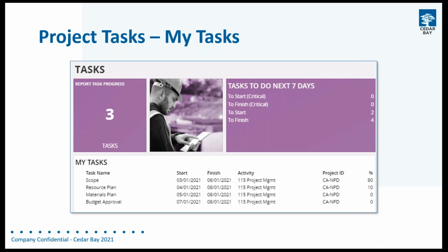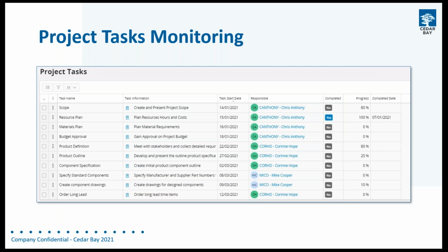And reporting progress is done slightly different to the way we report time. We can see on an activity that we have 200 hours that's been planned, and we have reported 150 hours, which means we are 3/4 of the way, 75% complete. But that doesn't necessarily mean that we've done all of the work that needs to be done. We may have booked 150 hours, but have we done all of the tasks that would lead us to that? So what we can do with tasks is, given a list of tasks, we can set up a way of monitoring progress against those specific tasks.